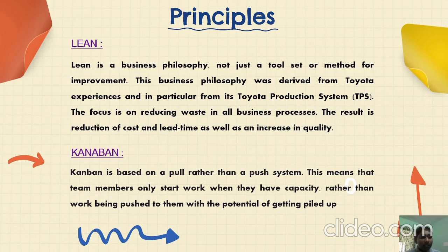The last one is Kanban. Kanban is based on a pull rather than a push system. This means that team members only start work when they have capacity, rather than work being pushed to them with the potential of getting piled up.